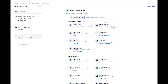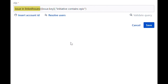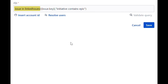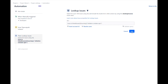Let's now add a new action so that we can look up the Epics linked to the initiative. Select the lookup issues action. In the JQL, we will combine the issue and linked issues function with smart values. This JQL function returns the issues linked from a specific key — in this case the smart value issue dot key, which is the issue that triggers the automation. For the link relationship, we will enter initiative contains Epics. Save the action.